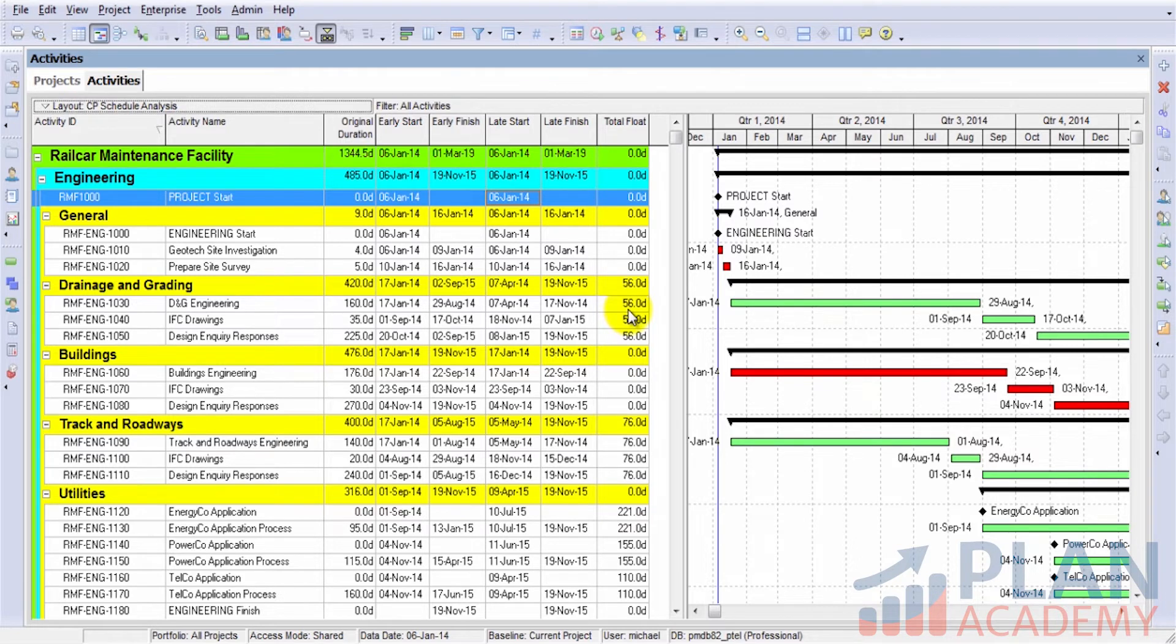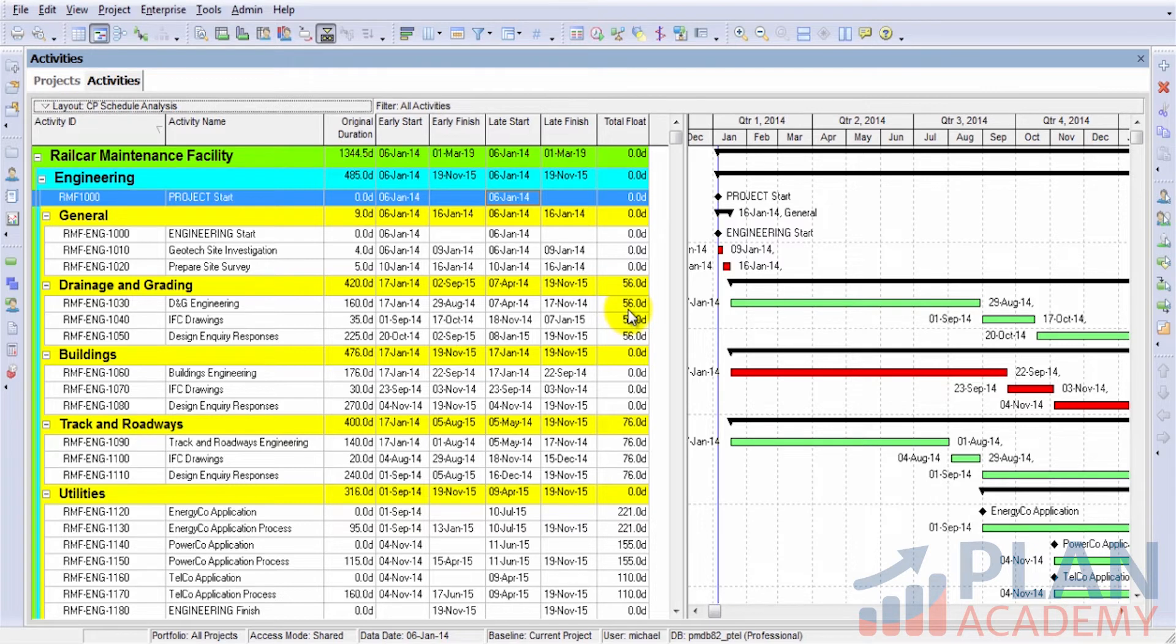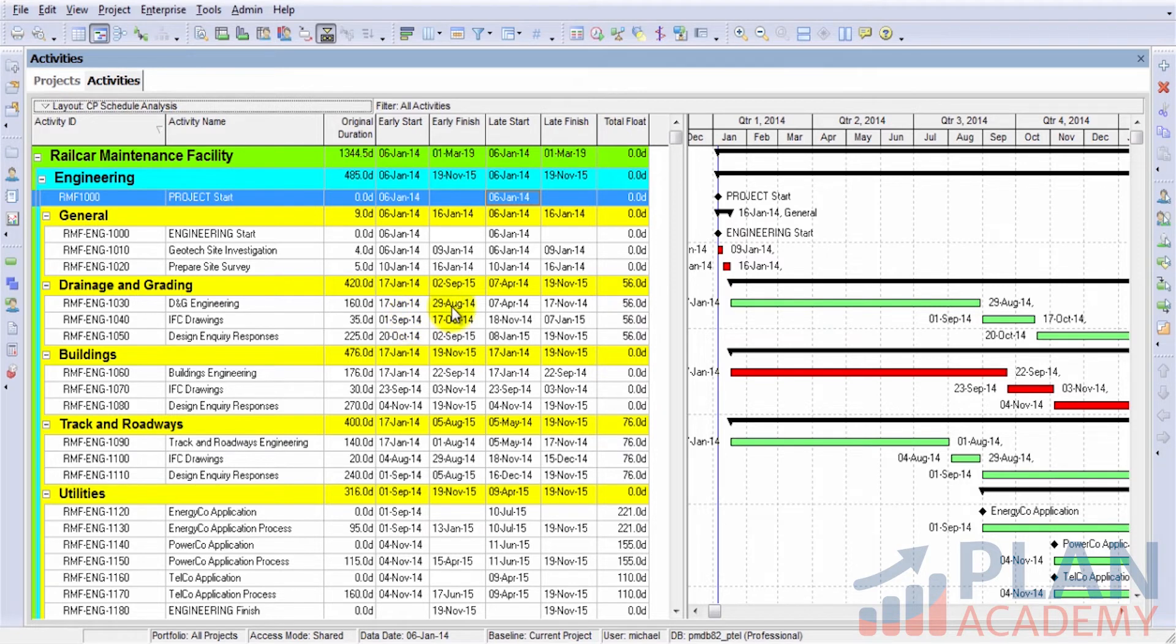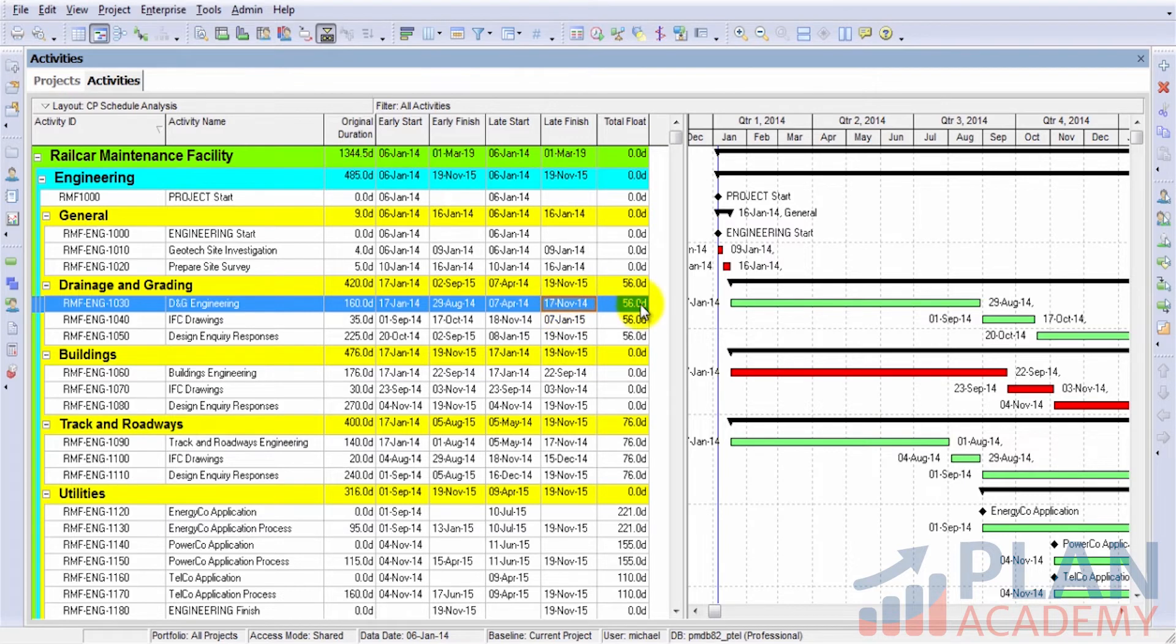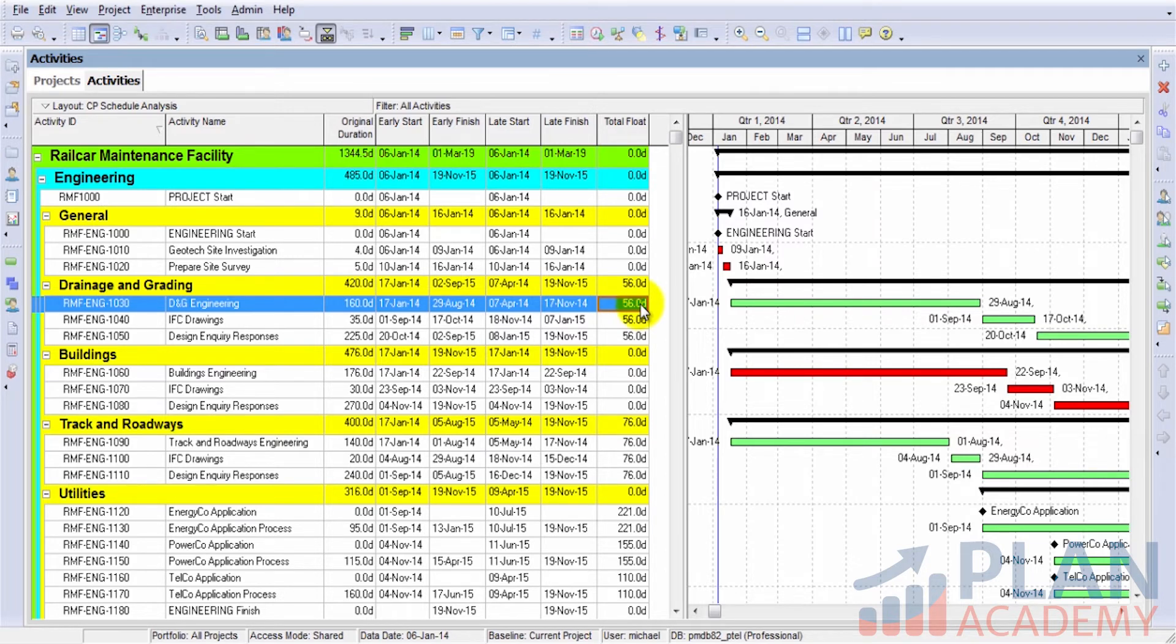So any activity that has total float, positive total float, is an activity that has some flexibility. And now we can see the differences. So the difference between, say, August 29th and November 17th turns out to be about 56 days of elapsed time, according to the calendar that's set up for this project as well. So now we can see total float.